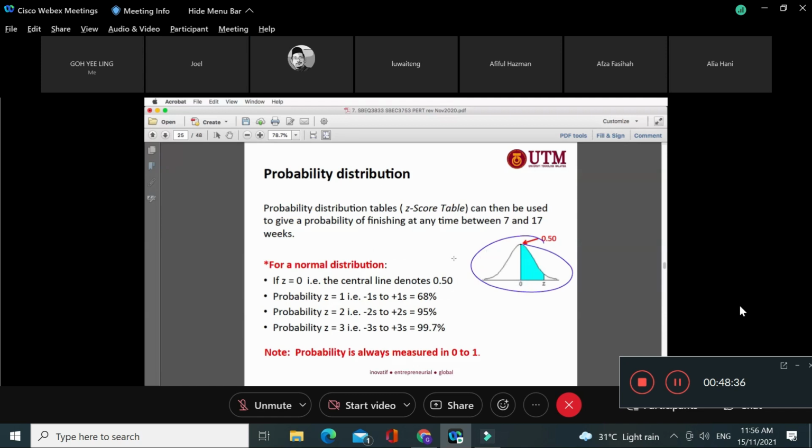So there are some questions related to this. For example, I want to know about this particular bell curve, where we know this is the 50%, and from end to end is 99.7%. But we ask, can this 12 weeks be done? Can we finish in 14 or 13 weeks? What are the chances? What are the chances? So basically the chances translate to what? We want to know the probability under the curve, under the graph, right?